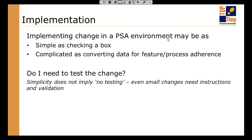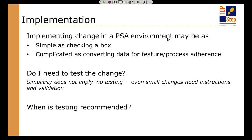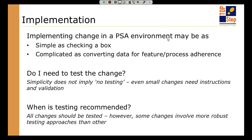Simple does not mean no testing. Simple still means there is a level of double-checking to make sure you've covered all your bases. Of course, when you have more complicated changes — like implementing a brand new integration with Salesforce or introducing a different way to do revenue recognition — those require confidence that you have a full set of requirements met and formal testing. But even at the end of the day, a simple checkbox should have a couple of checks to make sure the expected behavior has been tested and verified, and that you have enough information to communicate what changed to the organization.